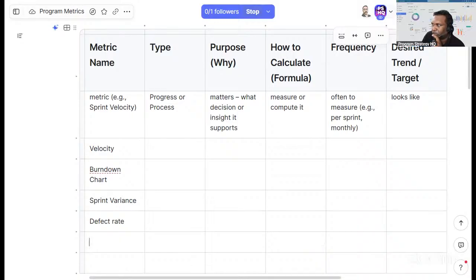Great. So the approach you're following is that at the start of the sprint you are expecting some work to come, and you're always reserving that capacity. That is great. Yeah, 10% of the sprint velocity is our reserve for the production support. Correct.